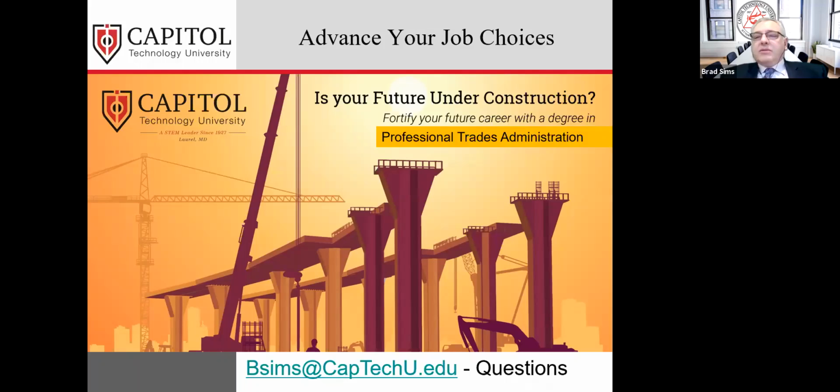I think the biggest challenge for folks that are good at doing their job and want to start a company is cash flow. The best example that I can give you is some of the small home builders. We had some excellent carpenters, and a carpenter wanted to start their own home building business, and they could build because they were good at carpentry. But they started their business and bought the supplies to build house one, and then they started on house two, but they took supplies from house one and moved it to house two because they wanted to start on it. They weren't getting payments because their progress didn't get them the cash flow they'd need in the bank to be able to fund house two.